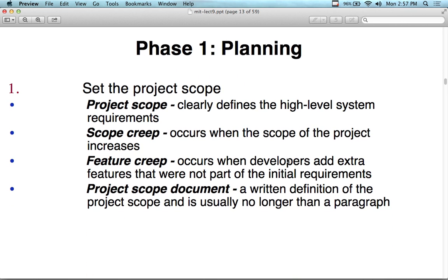So part of planning comes up with this concept of scope, and as I mentioned before, spiral models have a tendency to develop scope creep. That's when you're going around and around, visiting all these phases, and all of a sudden, wouldn't it be nice to have this feature too? And wouldn't it be nice to have that feature as well? And then all of a sudden, that's scope creep. When the original product you're building now has transformed into something else, and it just never ends because you keep adding stuff to it. Before you're done, you never actually finish the product. So you never release it.